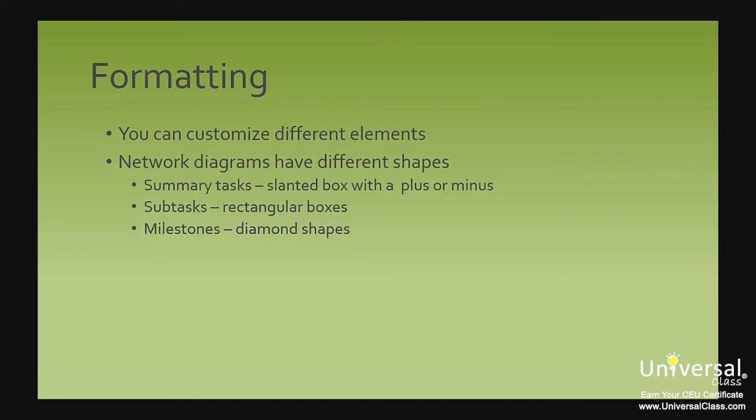On the network diagram view, you've seen the little boxes that comprise the look and feel of it. This view uses different shapes to represent different task types. Summary tasks use a slanted box shape and include a plus or minus symbol. Whether it is plus or minus depends on whether subtasks are shown or not. Subtasks are in rectangular boxes. Milestones are in diamond shaped boxes.